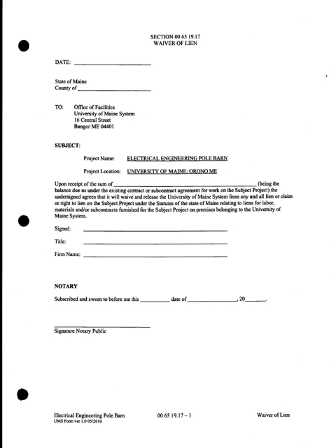Affidavit of payments and debts claims, release of liens. Anytime they have subcontractors, we will not pay the contractor until we have release of liens from their subcontractors. It's not unusual in this day and age to have a contractor collect all the money, not pay their subcontractors, and then the subcontractors come back after the owner saying, I never got paid for the work I did on this job, and suddenly the general contractor's gone out of business.